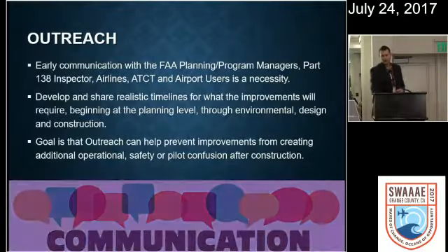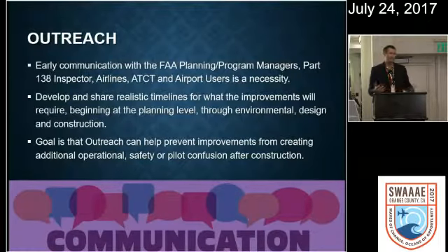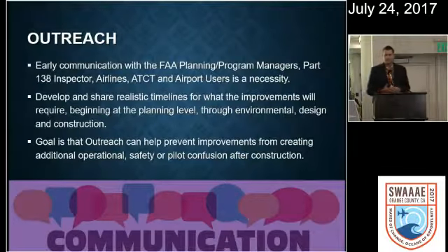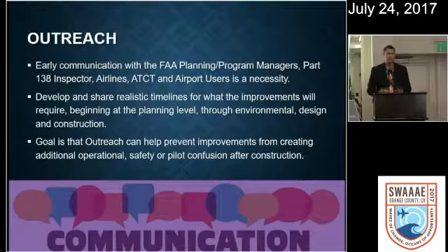And one of the most important things is the communication and the outreach. Early communication with your FAA planning program managers, your Part 139 inspector. I see Brian Armstrong is here. I'm sure he'd be excited to talk to you early on about these projects to make sure that you have the 139 inspector on board, with your proposed marking, configuration, layout, signage, that it's a well-oiled machine early on to make sure you vet all those different options, and certainly bringing in the airlines, the air traffic control tower personnel, and airport users. It's all a necessity. It's all part of the same team.